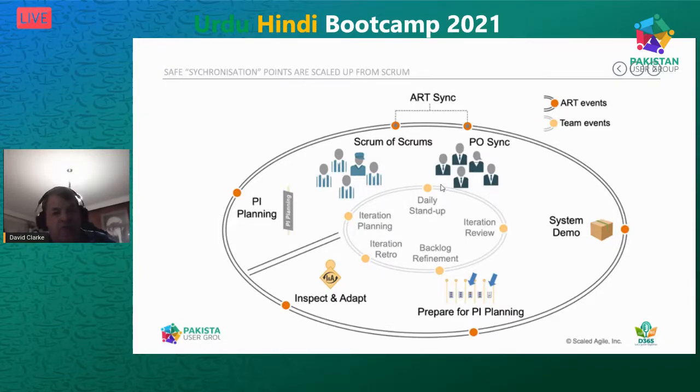It's generally about 2 hours, and the process is the product owner says to us, here's the work I want you guys to do. And we look at it and we size it and we go back to the product owner and we say, yeah, sorry, it won't fit into 2 weeks, but here's what we can do. And the product owner talks about it. There's a little bit of replanning, and then we decide what we can do in that 2-week period.